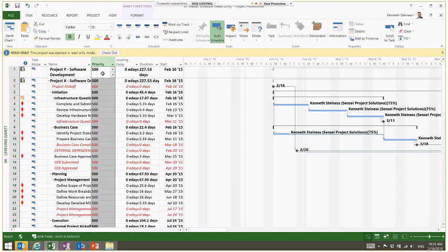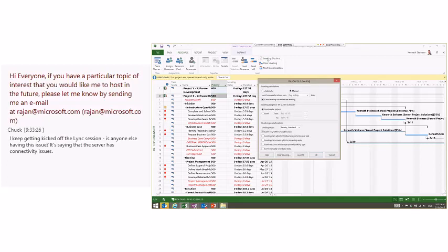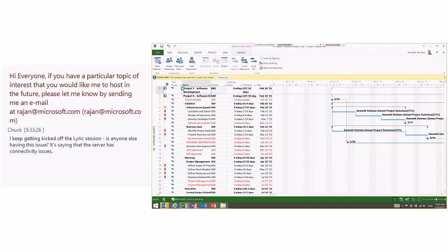Okay, great. So now let's say that Project Y is a higher priority project than Project X. This priority scale goes from 1 to 1,000, and 1,000 means do not level. So I'm going to say this is a priority 600 project. So the higher the number, the higher the priority. So I've just made this project a higher priority. Now when I go into my resource leveling options and I choose priority standard and uncheck level only within available slack, I'm going to go ahead and do my leveling. Just going to expand this here too. I'm going to say level all.